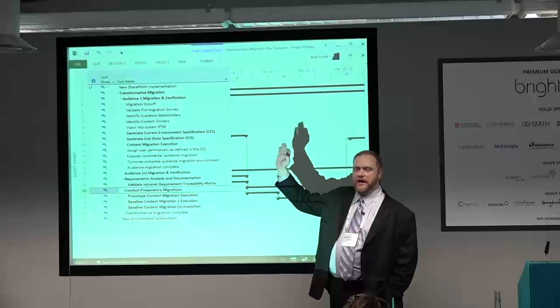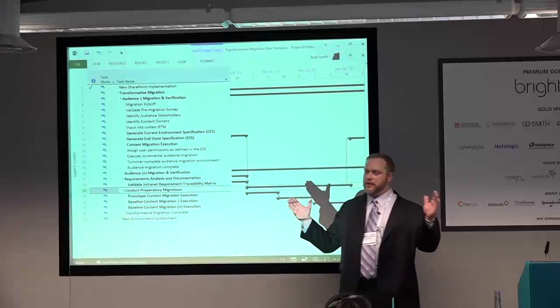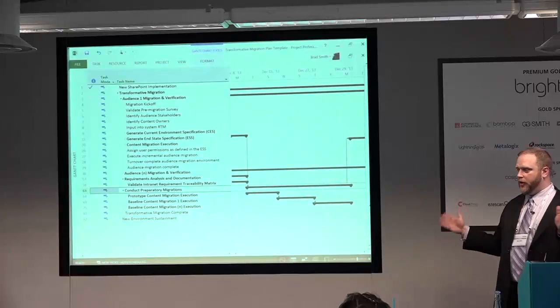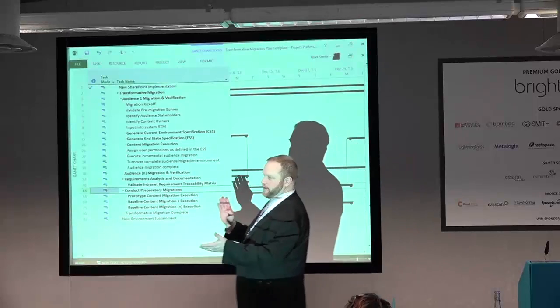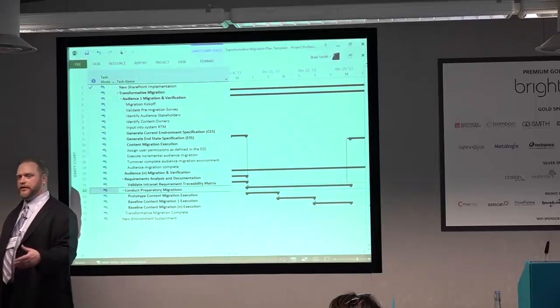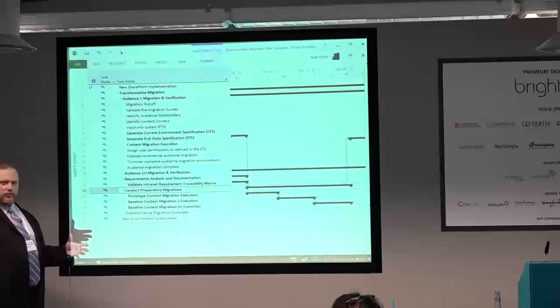We had 10 migration audiences, and they corresponded with the components of FEMA, as they call them. There's response, and there's recovery, and there's FIMA, and then there's policies and plans, and there's the office of the administrator. So they had an organizational chart. They took that chart and built the scopes for each audience, and then in the project plan we created a number of audiences equal to the number of components that they were running.